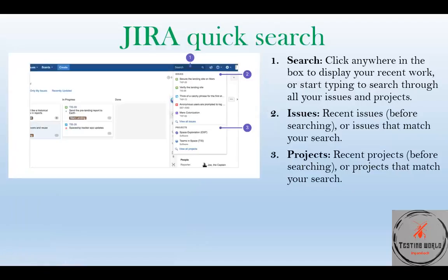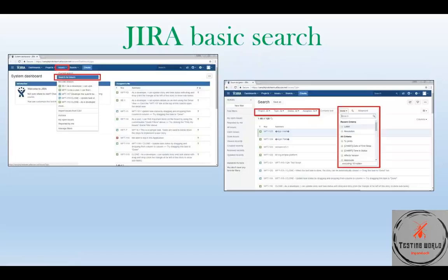Let's talk about search types in JIRA. The first and most popular is quick search — it's a search bar where when you start typing, you see a drop-down list with matching results: the first block is issue-related, the second is project-related. Another type is basic search. If you hit the issues menu item, click 'search for issues', you can select different options like project, type of issue, status, assignee and more. As mentioned, you can save your search as a filter and reuse those saved filters for frequently used search options.